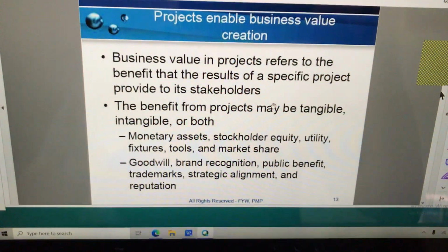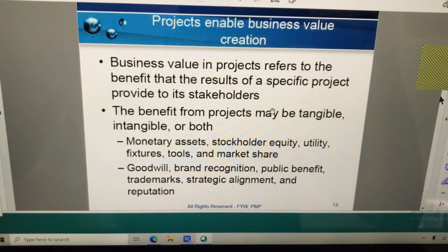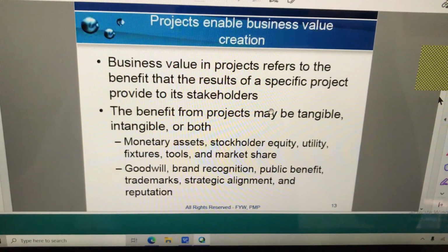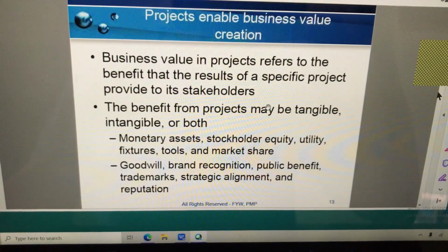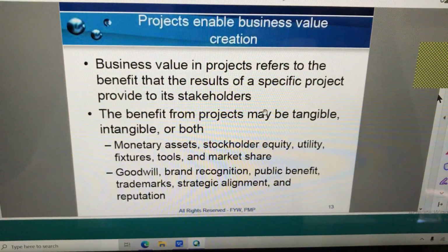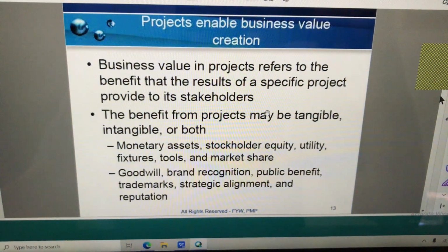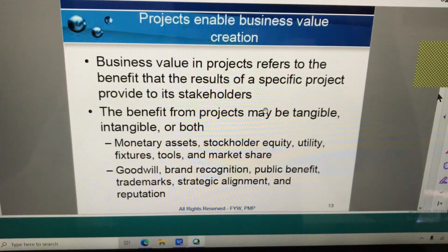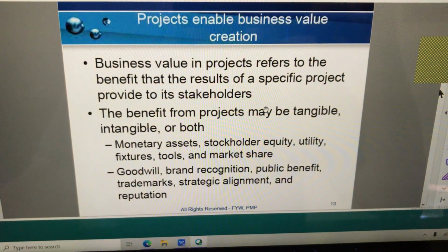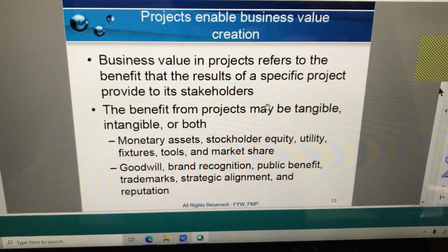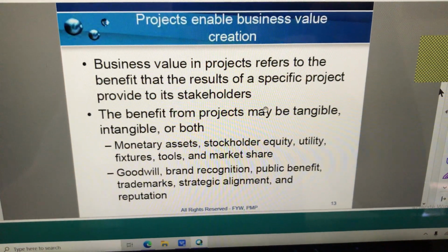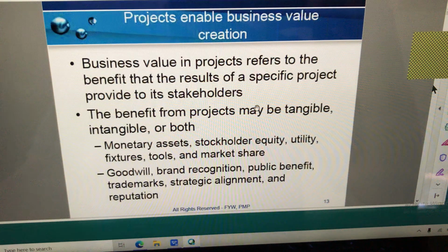That, when converted, takes a lifetime. Let's say the lifetime of our swimming pool is 15 years. So I will calculate all the income that's going to come from the business for the 15 years and put a net present value as of today, what it is worth, taking the interest rate into account. And I will also net off any operational expenses. That will be maintenance, right? Sometimes some tap will be leaking, sometimes some hole will be there, swimming pool water will go out, cleaning is required, you have to put disinfectants, etc.